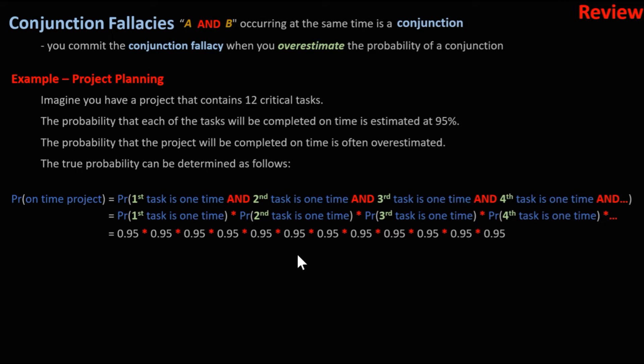We end up with 0.95 times itself 12 times, or 0.95 to the power 12. When we multiply decimals with each other, they quickly become smaller. In this case, the probability of the project coming in on time is 54%.